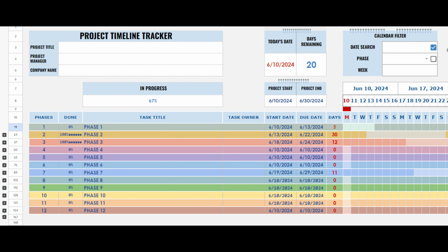2. Defining the project. Input the start and end dates of the project. The system will automatically calculate the other dates. The dates you enter within each start and end phase will be calculated. The smallest date in the start column and the largest date in the end column.